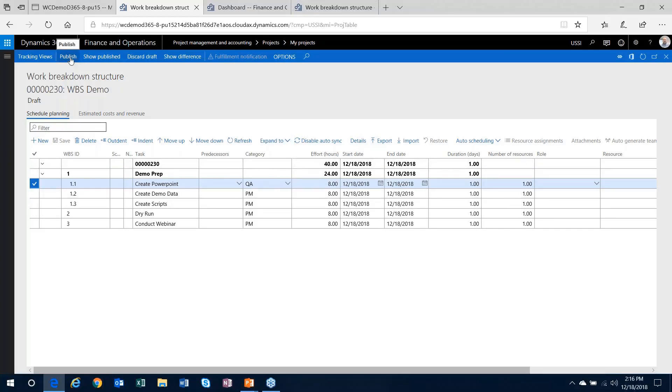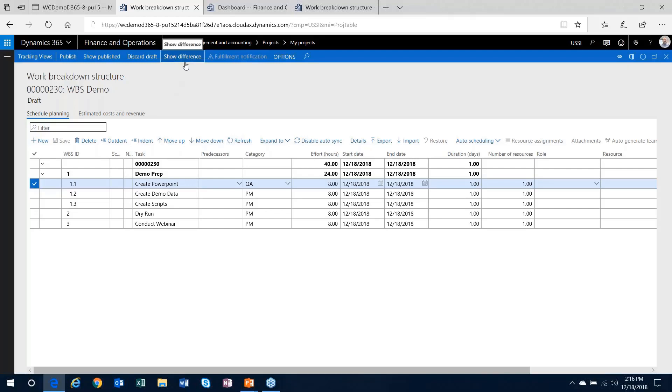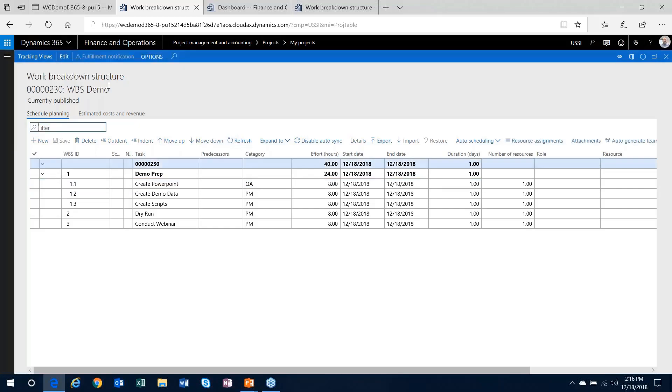I can do all the work that I need to do in draft without it affecting the work breakdown structure that people are currently looking at right now. Only when I hit publish do the changes that I make in this form take effect. This allows you to maintain a draft. You can show differences if you're adding tasks to the work breakdown structure, show the difference between what was currently published and what's in your draft. Some visibility into changes that are occurring. But once you're ready, you hit the publish button, and then everyone else in the system can now see that work breakdown structure.